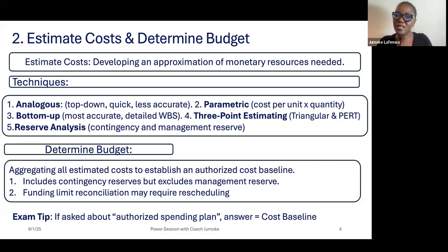But you ask the team, what is our actual cost? What did you actually spend in executing these 2 rooms? Then they told you it's 35,000 Ghana cedis. 1, you are behind schedule. You didn't finish 3 rooms. 2, you didn't spend 20,000 based on what you planned. Your earned value should be 20, but you have spent 35,000 Ghana cedi. That tells you that if you continue, this is where the forecast comes in.